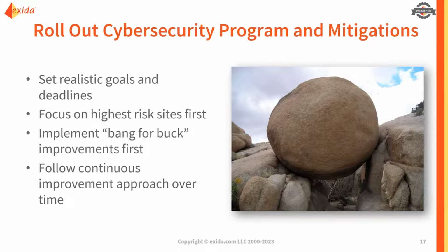that we can to reduce the risk now, and then look at having a continuous improvement approach for more invasive countermeasures that may have a potential impact on availability or may require system downtime to implement. So we can always think about what can we do now to reduce the risk, and then what's our plan for implementing additional controls that are required over time.